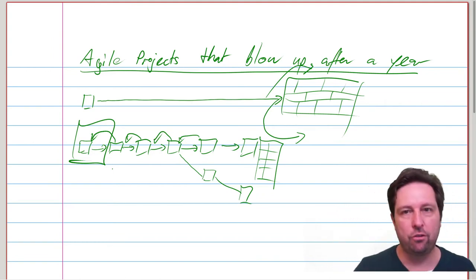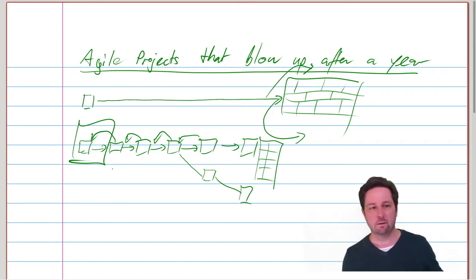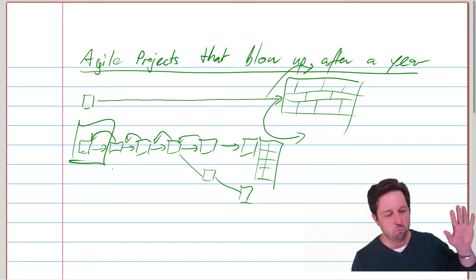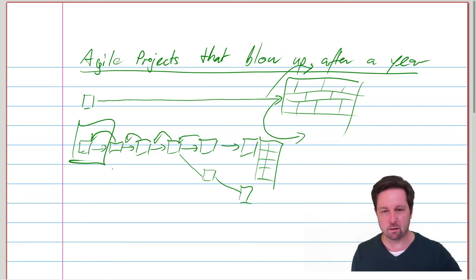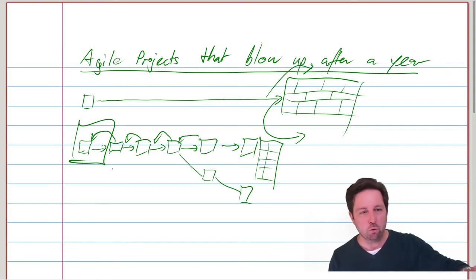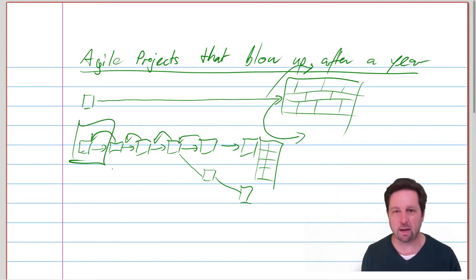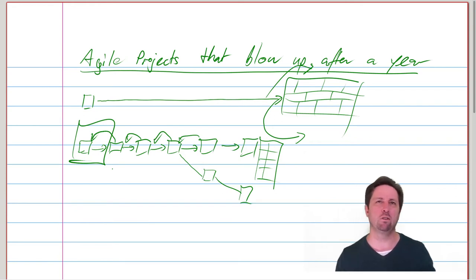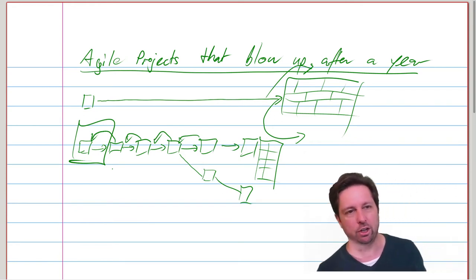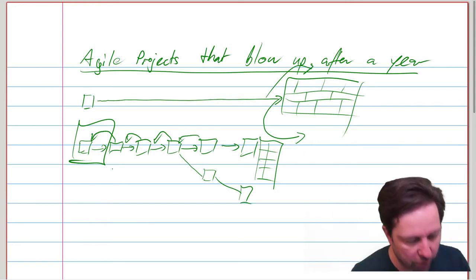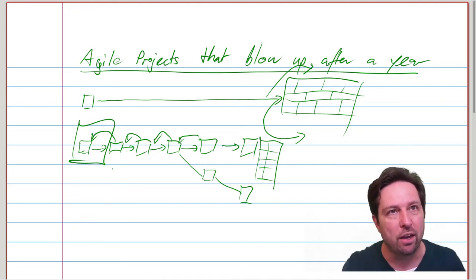And this is why it's so important to really deliver increments of your product as early as you can to the point that you even deliver maybe in the first iteration already something. I know it's hard. I know you're still getting your bearings. I know you're still setting up your infrastructure. If you force yourself to say, okay, there must be something we can show to the customer after two weeks.